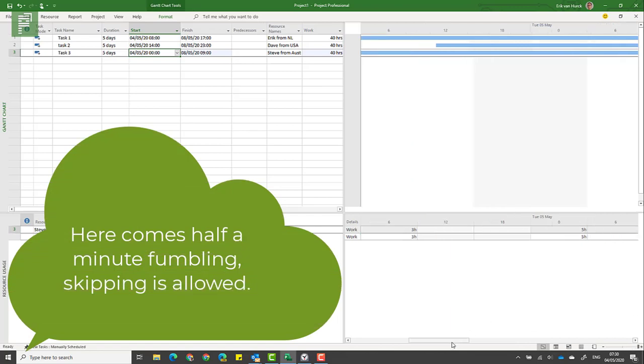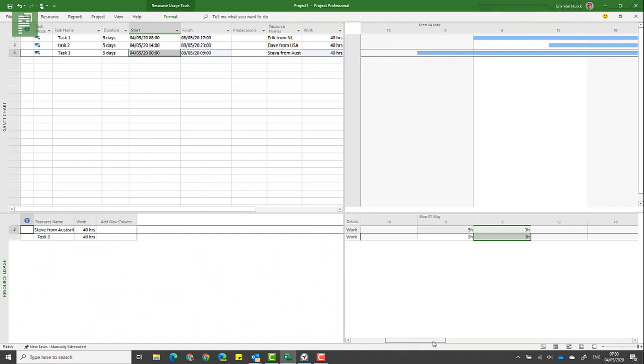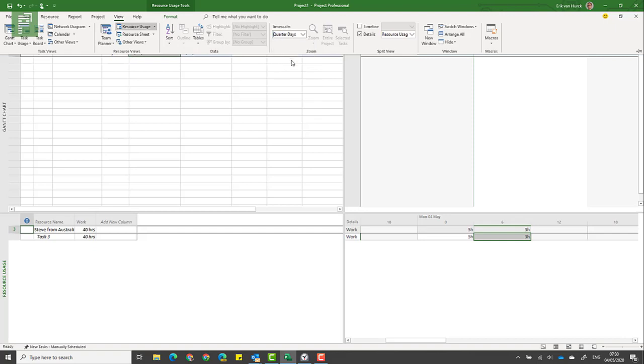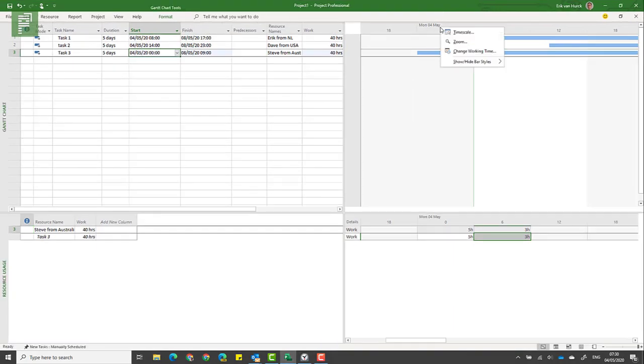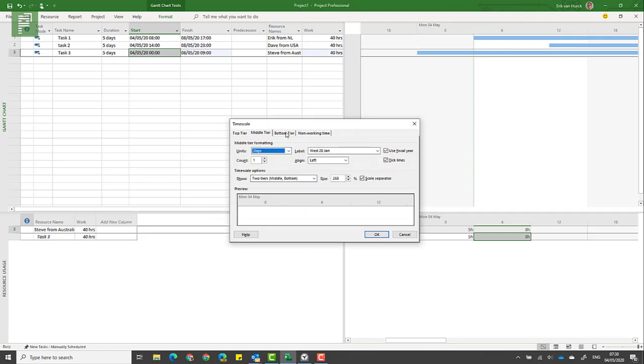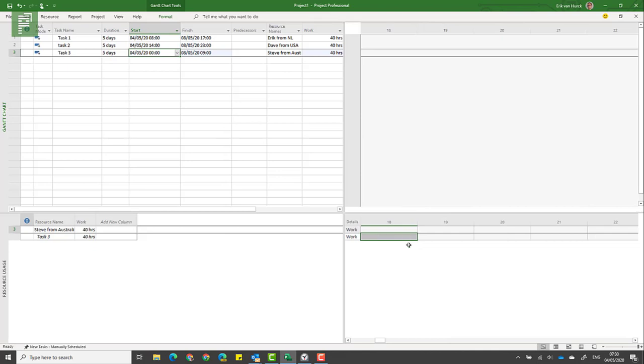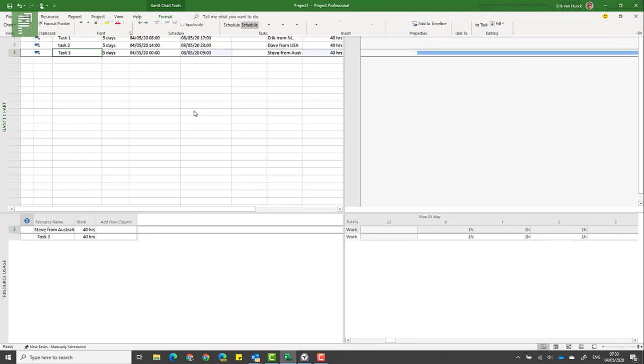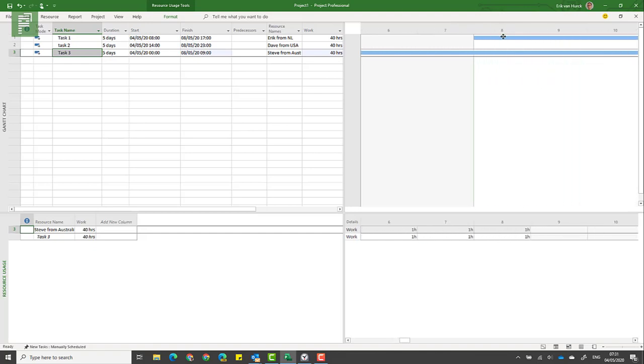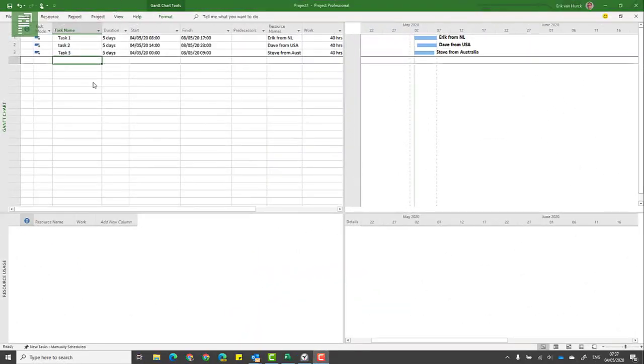I can zoom in a bit more even. I'm going to zoom in, and let's go to View, Timescale. The bottom tier is going to be one hour. That looks way better. Let's navigate to tasks, scroll to task. Here we see that Steve actually begins at the first hour of that day.